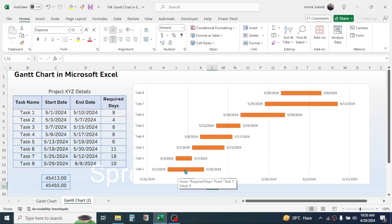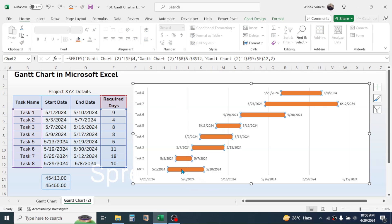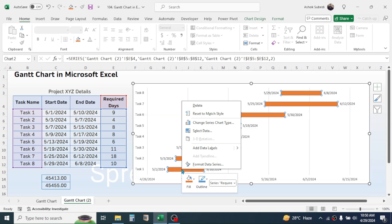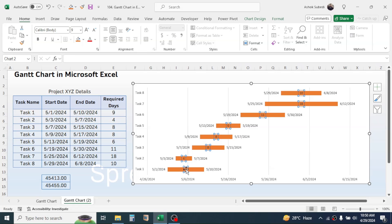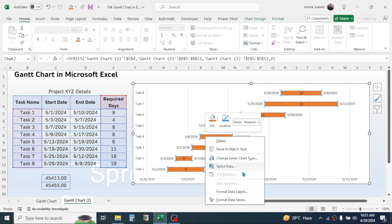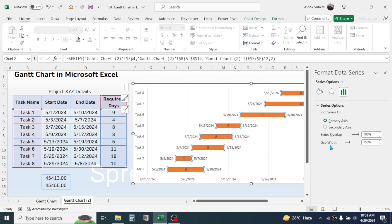The starting date and ending date are now shown to the left and right of the required days series. To display the required days inside the bar, click on that series, right-click, and click Add Data Label. This adds the required days value inside the bar. To increase font size, click on the data label and go to the Home tab. To increase the bar size, right-click the series, click Format Data Series, and reduce the Gap Width.